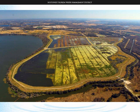Turn the mic on, please, John. Hi. Is the ongoing operational cost pretty expensive, or have you minimized that in some ways? Yeah, it is expensive. The initial estimates for annual maintenance and operation of the wetland treatment system was $700,000 a year. We've refined those costs over time, and we think it's going to be closer to about $450,000 a year. So just annual, and it is going to be quite expensive.